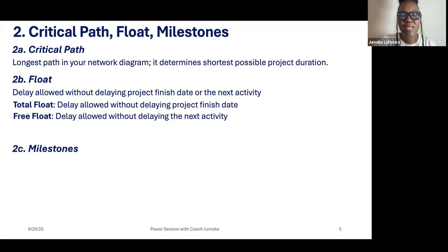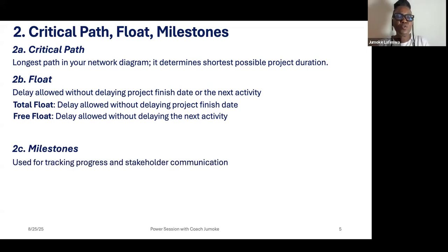No, they do not have it like that. The milestones are used for tracking progress and then help in stakeholder communication. So when you say a milestone is to concrete, is to lay blocks to lintel level, is to do plastering, is to do roofing, is to do ceiling, is to lay pipe. So once you finish concrete at the foundation, that's a milestone.